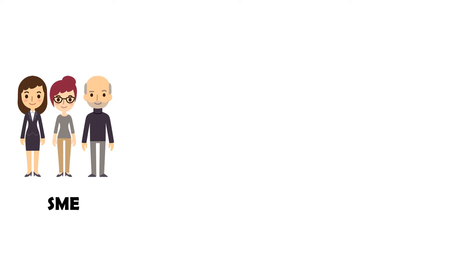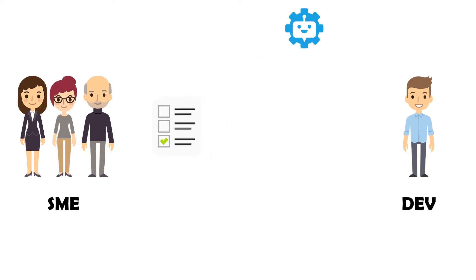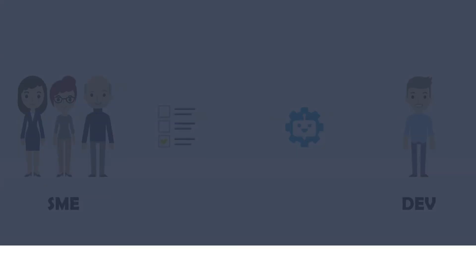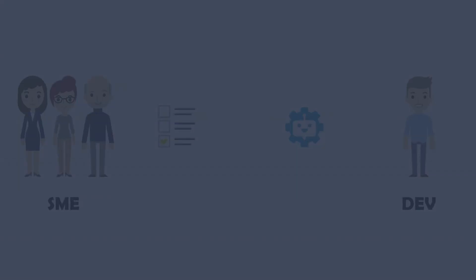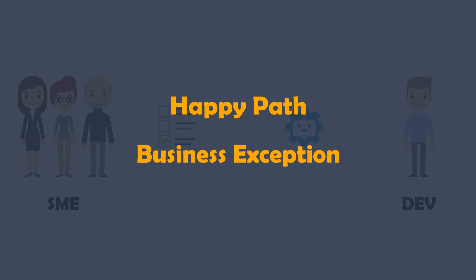For testing the department supplies some test cases for the developer, so that the developer can process these test cases with the implemented bot. These test cases must cover all scenarios, so that the bot does not cause any problems later in the live operation. This test checks all possible scenarios, whether it is a happy path or a business exception.